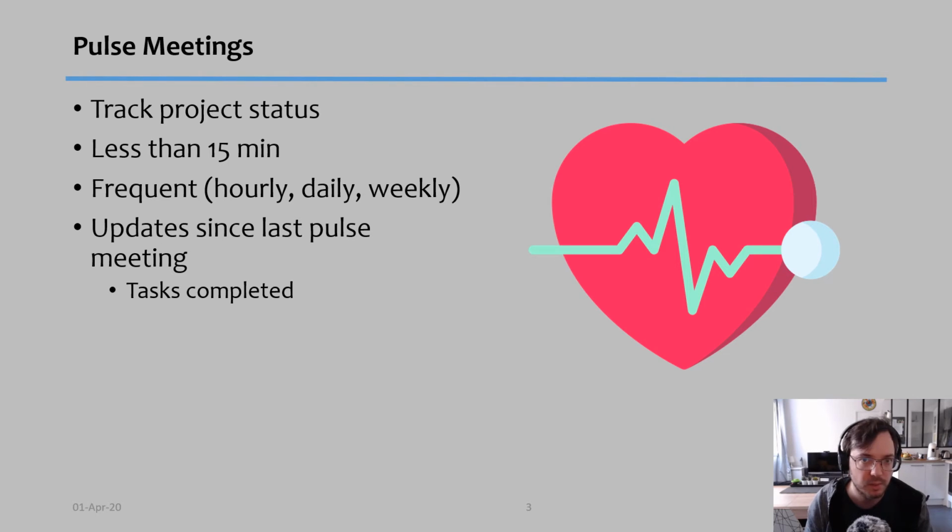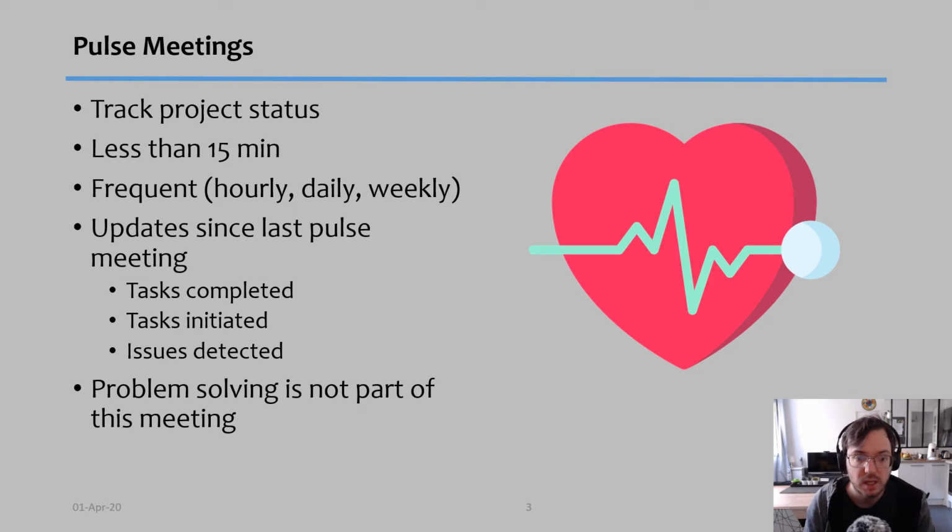So what do we mean by that? What tasks were completed since the last meeting, what tasks were initiated, and what issues were detected so far. But attention, this is not a problem solving meeting. Problem solving is not part of this meeting. I'm going to talk about it in the next slide.